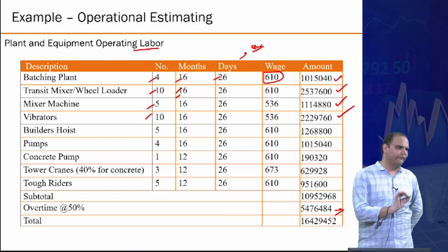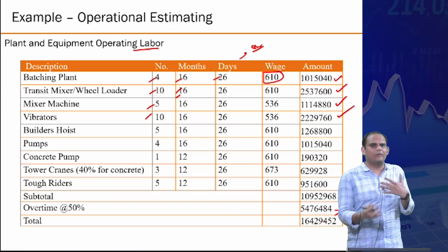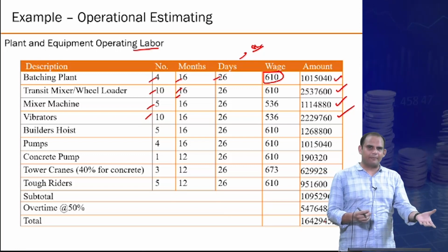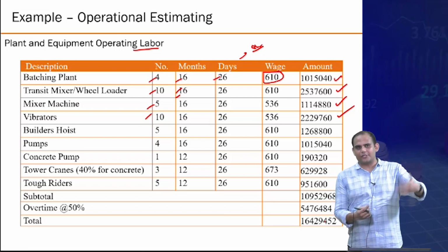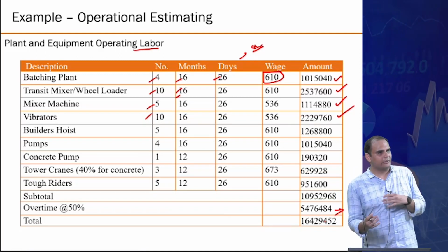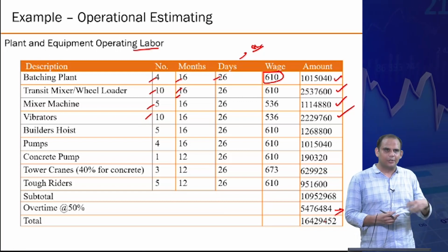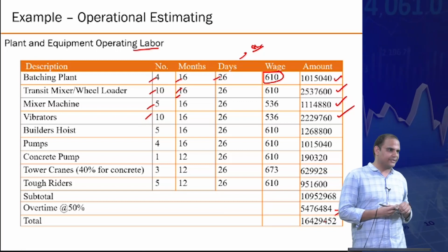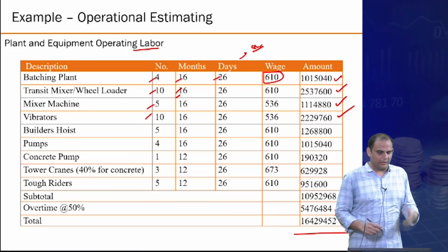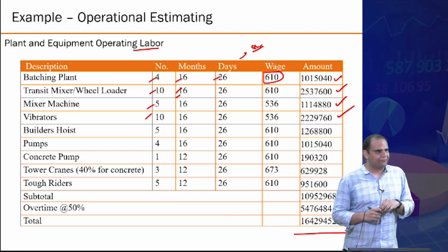In that, there would be some overtime again you are using. There's a lot of overestimation involved in these things, because there's a lot of uncertainty around it. It's not that you are unnecessarily giving 50% extra. It's just that because there's so much uncertainty, you actually end up spending much more. So you typically estimate on the conservative side rather than the too optimistic side, right? So you get the labor that you will spend only for operating the machinery. Got it?